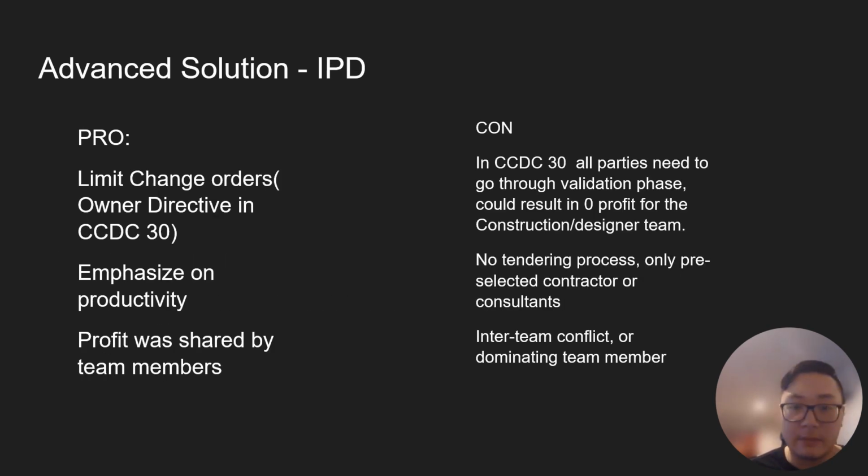IPD, which Dominic talked about a couple of days ago, actually has really good pros. We limit the change orders since in CCDC 30, which is the contract that leads to the IPD in Canada, they don't allow the owner to issue change orders outside of the general scope. So there is a limit to that.